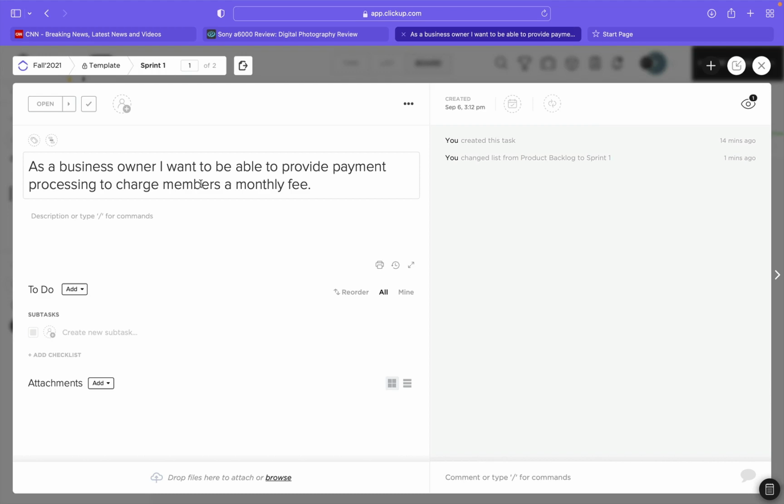And it tells me again what the user story is. What we want to be able to do in a sprint plan is, for each user story, break each one down into a series of subtasks. What's a subtask? Well, it's an individual task. They call them atomic tasks sometimes because they can't be divided. It's a task that needs to be done to fulfill this user requirement, and it takes, in most cases, many, many tasks to complete a user story, to actually build that software.